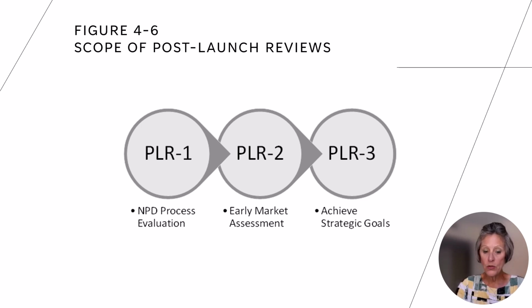The product launch plan, Stage 5, including a sales rollout plan, is approved by the gatekeepers at Gate 4. When customer education or training is needed, the NPD team must note these steps in the product launch plan so that gatekeepers are aware of all risks in the go-to-launch decision.